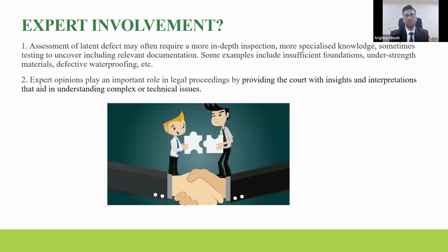So the person or the team who is doing this root cause analysis will generate a report. Now, in making the claim, this report becomes one of the most important documents. Why it becomes an important document is because it will have a clear and detailed record of the defect, which is crucial in formulating a claim at a later date. So this is one of the documents which needs to be maintained.